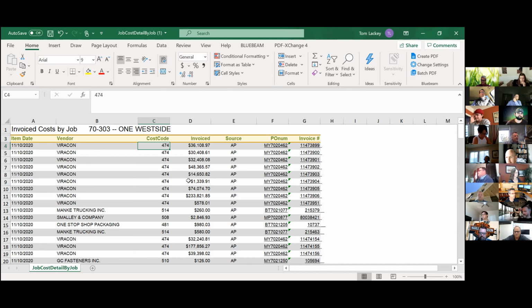Well, I think what Steve has said is that regardless of whether you're providing invoices, you're still going to do this exercise. You're still going to charge that same amount, that 20% plus whatever you have for that month, but you're not going to show invoices. Yeah, that's a good clarification. You're still going to do this process, but no, we're not going to submit invoices if they're not required.